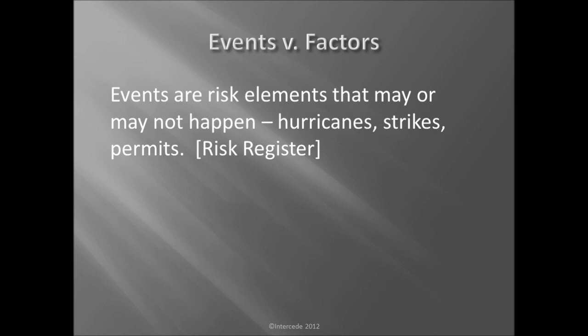There are some times when you would run risk events within a schedule, but I would oppose that. I think that risk events can be dealt best with running either what if reflections or what if special schedules that deal with the risk, and then you can deal with the likelihood of occurrence. But what you really want to know, because many of these things like hurricanes, you don't know when they're going to happen or how much the impact is going to be. And so it's more difficult to model than you would expect. I tried to do hurricane modeling and did not work out very well.